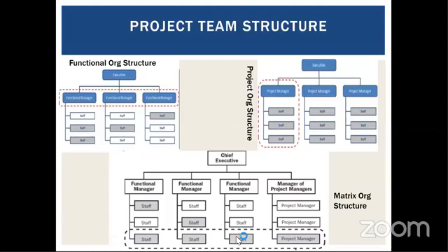The BA is involved and will know what things are not functioning the way they're supposed to according to the requirements that were written, and the use cases that were created based on the business logic or business rules. So they can let the project manager know that functionality is not where it needs to be, or it's not functioning properly, but it's then the project manager's responsibility to talk to the development team's management to understand why there are delays and if there are any roadblocks. It's not the business analyst's responsibility.